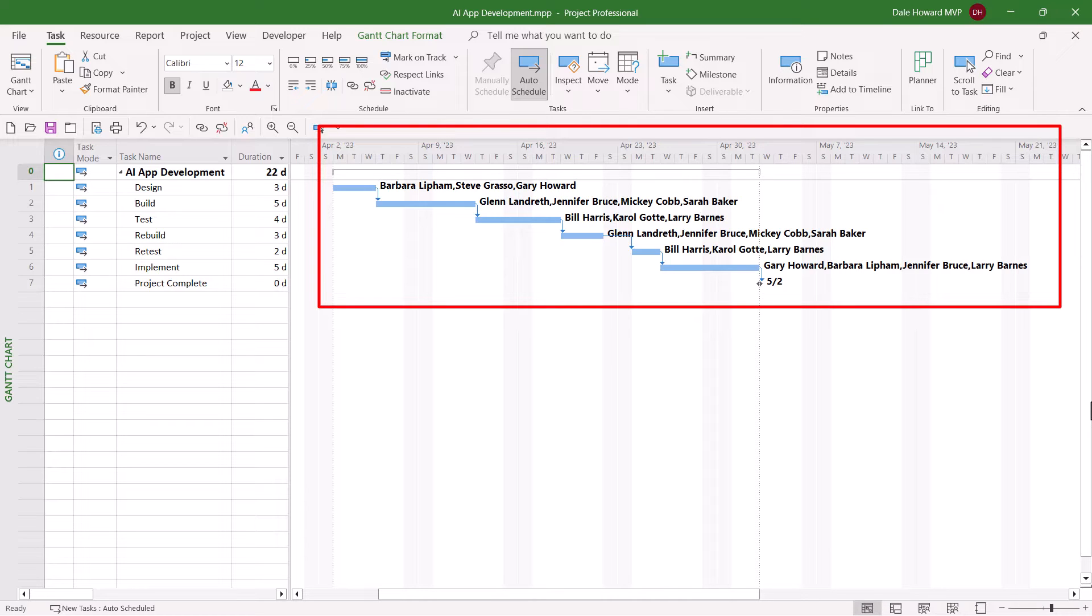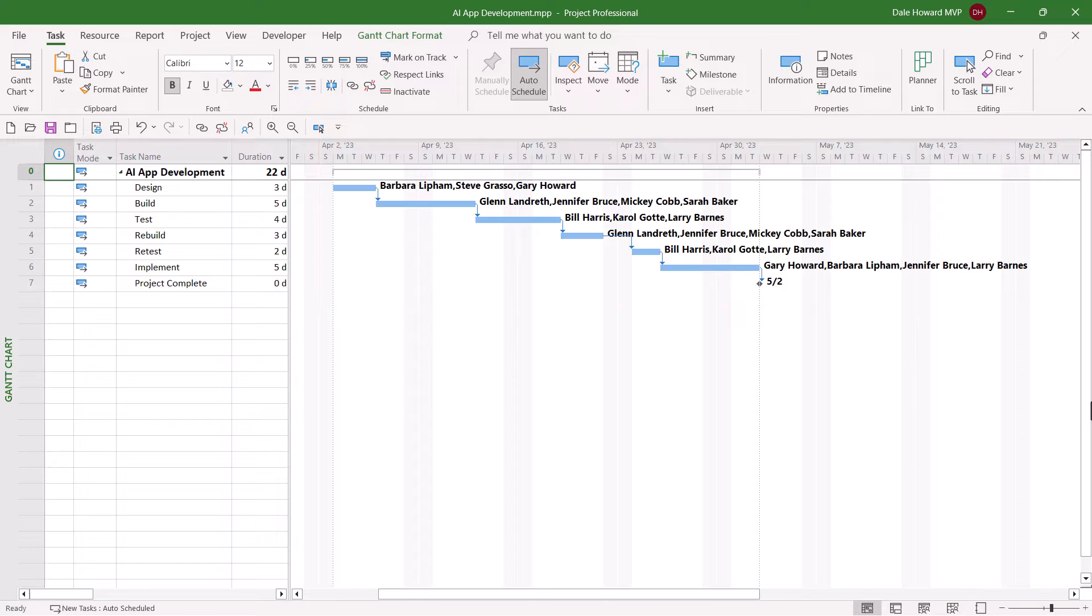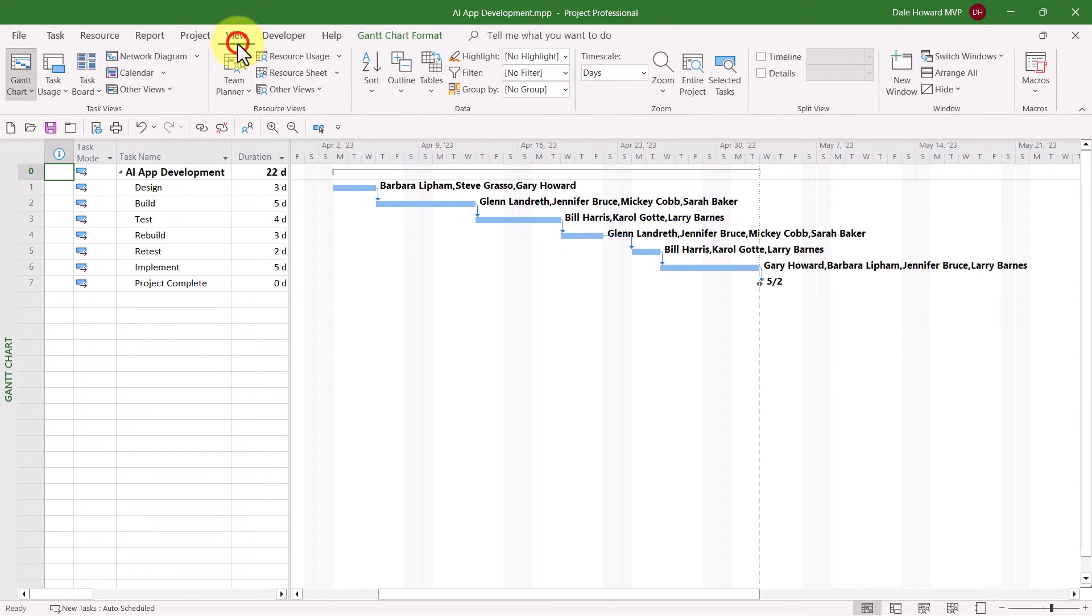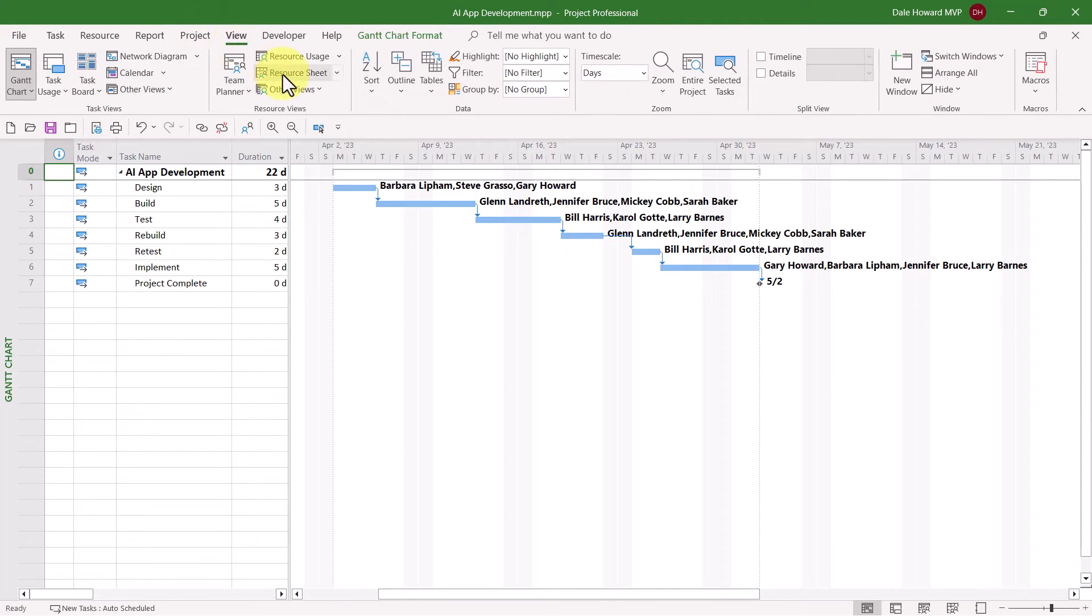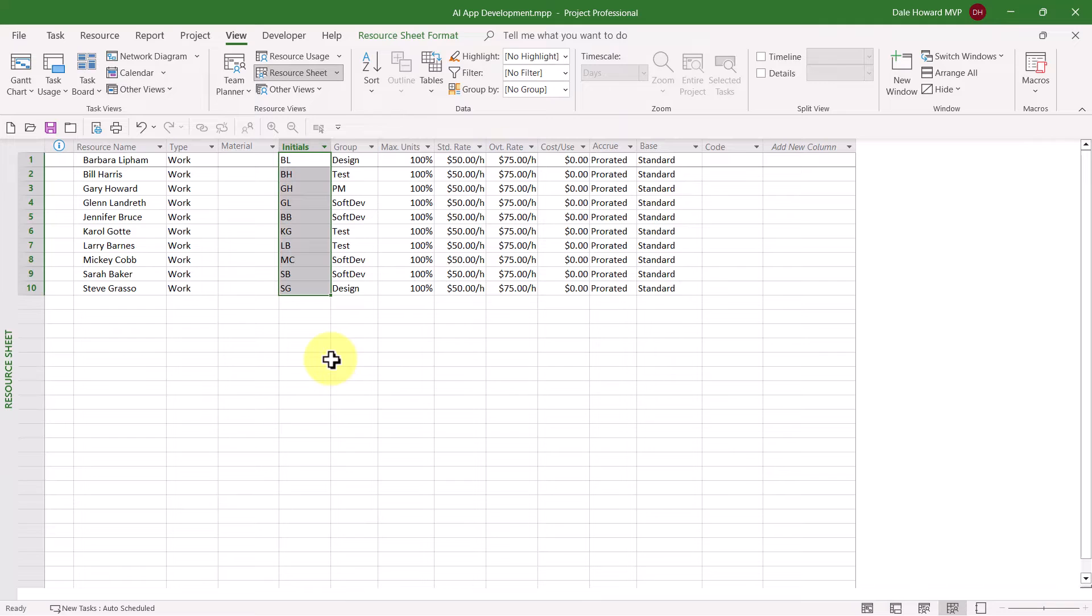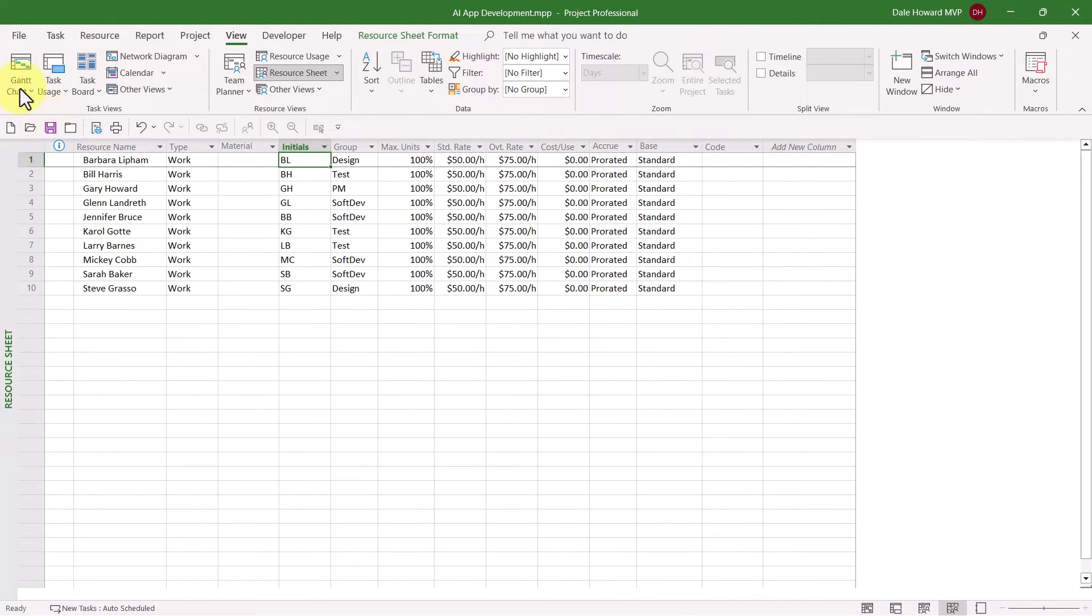There's actually two ways to do this. The first method is to replace the full names with their initials. Here's how to do that. Go to the Resource Sheet view of your project, and then type either the two-letter or three-letter initials for each of your project team members. You can see that I've typed the two-letter initials.